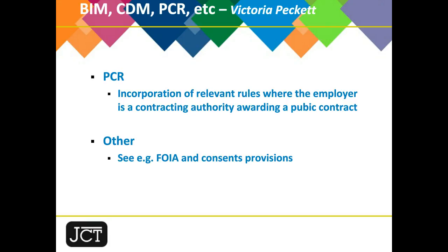There are also other provisions that require the contractor to provide basic information on subcontractors. So provisions allowing us to obtain those bits of information have been included. There are provisions within the regulations that give the contracting authority the right to insist on the removal of subcontractors where that subcontractor ought to be excluded for the reasons set out in the regulations. So we've allowed for that too. And we've also allowed for the rights of termination in certain circumstances.